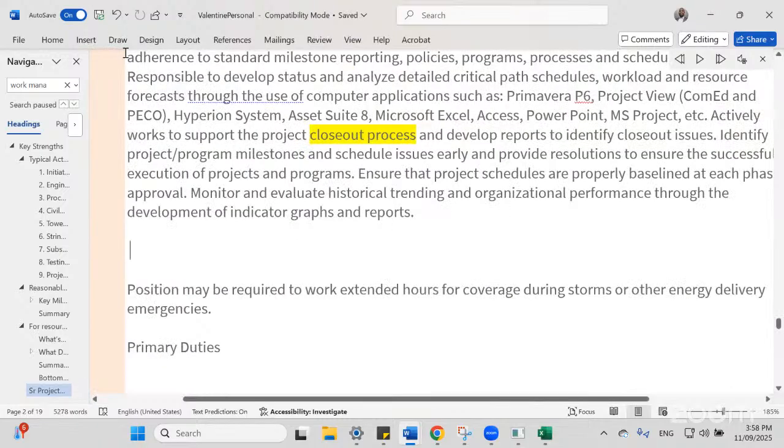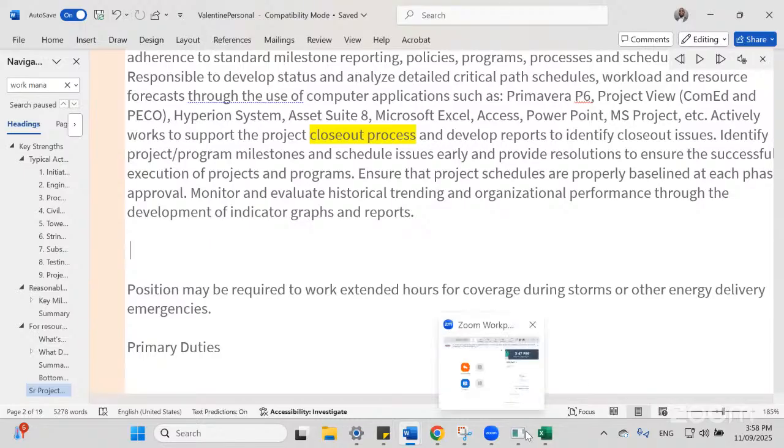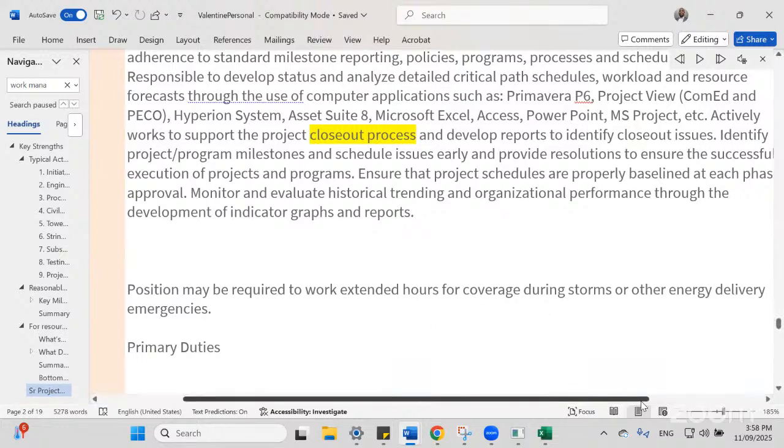And after preparing all reports, like escalation, reconciliation and budgeting and everything, after cross checking, we can submit the report and do the official handover to the client. Close out process.